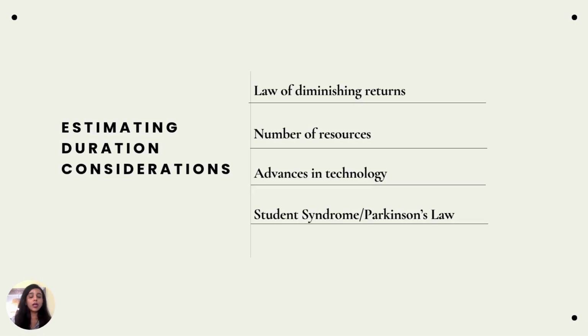While Parkinson's law is similar but a bit different, where, for example, you tell your manager that it will take 5 days. But actually, the task is too small and it might complete in 2 days. But you just add a little buffer and say the task will complete in 5 days. So the task will take the full 5 days. It's Parkinson's law. That's what Parkinson's law says.